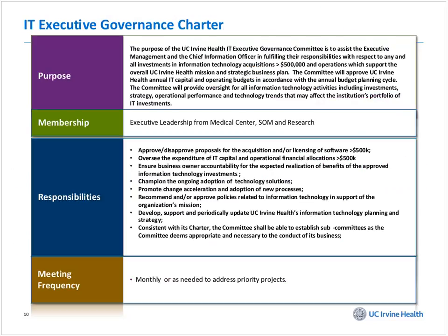Just an example of our executive governance charter. This is really important when you kick these off or you're going to revise yours. What is the purpose of the group? And you can see for us, the big thing here is everything is handled at those functional groups, but if it's greater than $500,000 and kind of links to the strategic business plan, we deal with it at the governance committee.